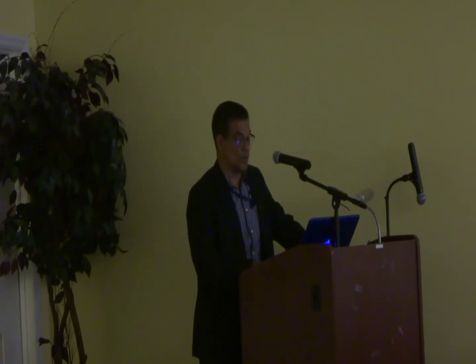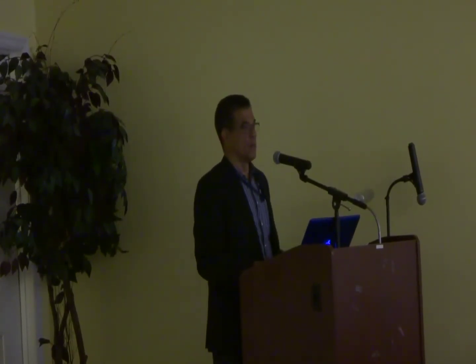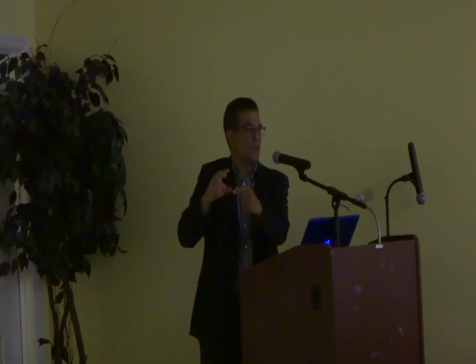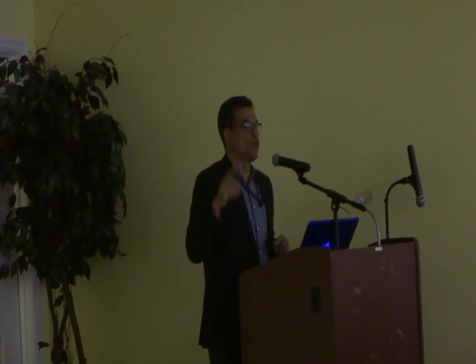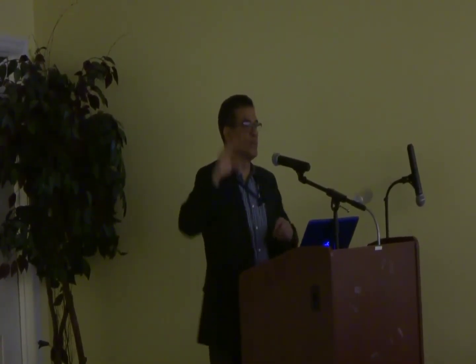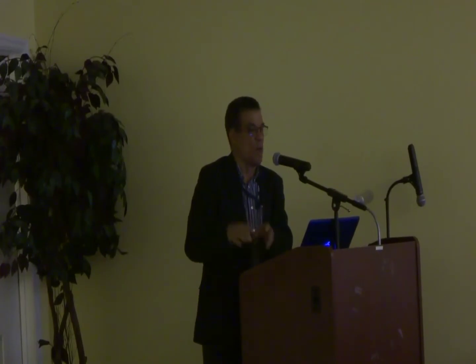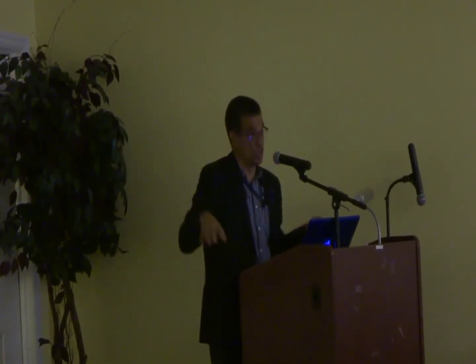You can have a different form of tender because you want a form of tender that is in accord with all that you have set out. If the contractor sees that he can do it a different way, you don't want him to tender a different way, you want him to tender on that way. If he has a different way, he can provide a separate alternative form of tender with certain conditions which are not part of your conditions.